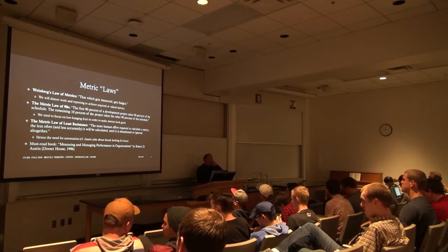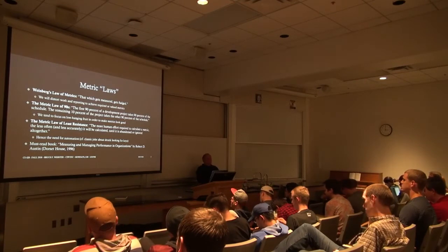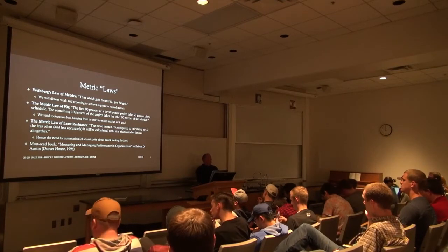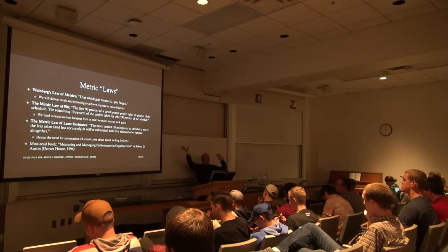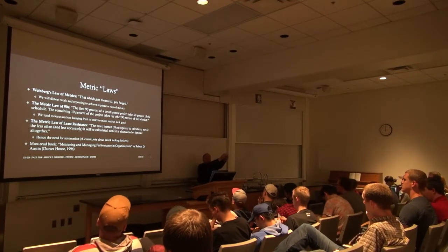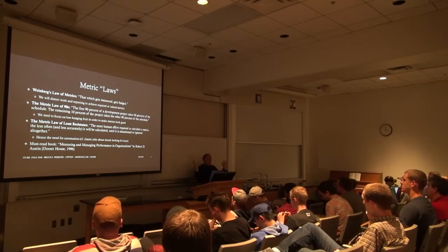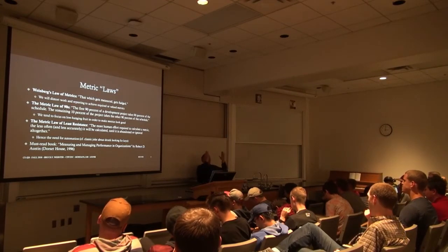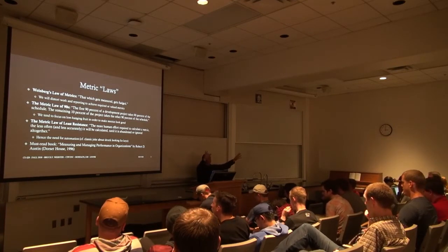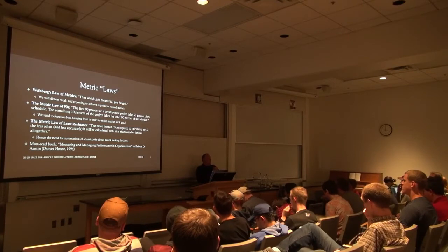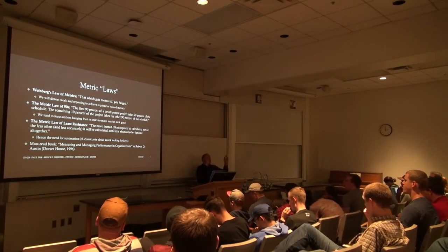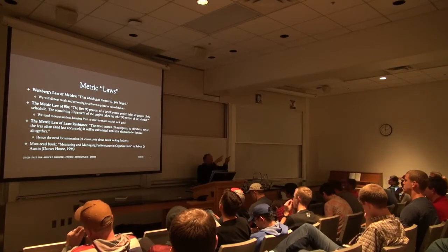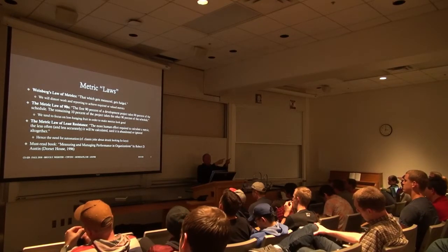In projects I have gone into review, either as a consultant or as an expert witness, what you end up with are projects that never stabilize. Remember the PERT charts where we saw lots of parallel paths and then all coming together at the end? Well, a lot of projects are like that. You've got some number of parallel paths which are all doing the low-hanging, easy fruit. They're pushing off the hard problems. And then you get to that point where they all have to talk to each other again. And not only have all the hard problems been delayed until then, but often the solutions that have been picked in those paths are incompatible with the set of hard problems that remain.